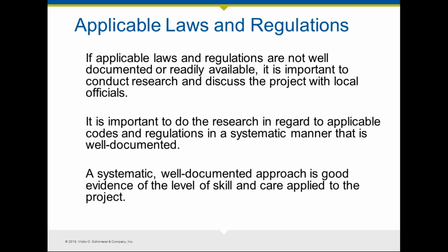When you do the research, it has to be done in a systematic manner so that you're addressing each known functional area that needs to be identified and addressed. If you do this in a systematic and well-documented approach, then at least, if there's a dispute with the client, you can show what steps you took to identify what the pertinent laws and regulations are, and what the nature of your services was, so that you can show that you did diligently try to identify all the pertinent laws